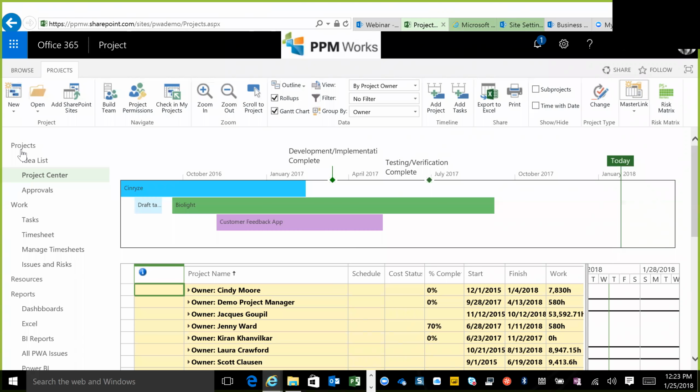If you are using Project Online or even Project Server, PWA, in any form, you'll note that when you're trying to track benefits, you're not able to do that in a project detail page because it doesn't give you that table where you can look at your benefits for Q1, Q2, Q3, Q4, etc. So that would be one idea too, to fulfill some tracking requirements that you may have on the actual project site. Another one is to improve adoption.